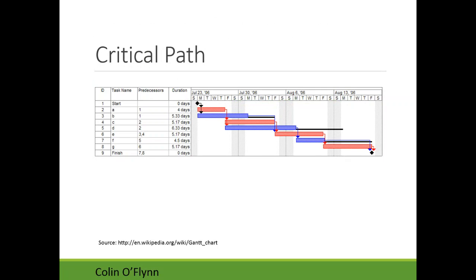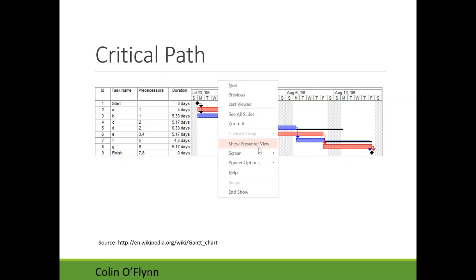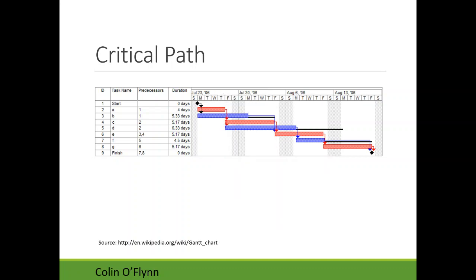Here's a Gantt chart showing the critical path — highlighted in red. Any delay on the red path would delay the whole project, because everything there is back to back. In blue, there's room to spare: if a blue task expands, as long as it doesn't expand too far, it won't delay the project. But if tasks in red expand, they will delay the project — that's what makes it the critical path.